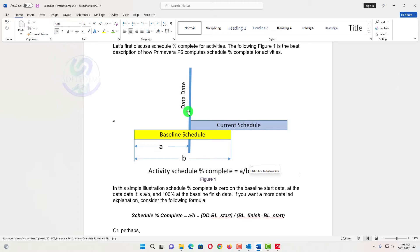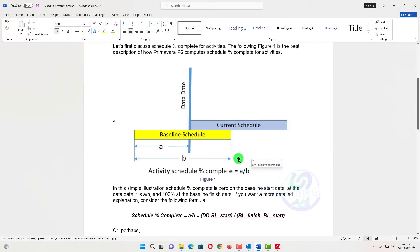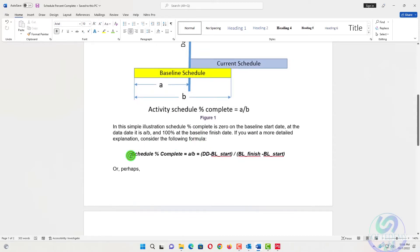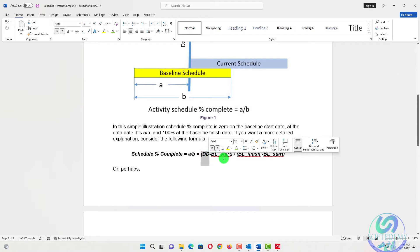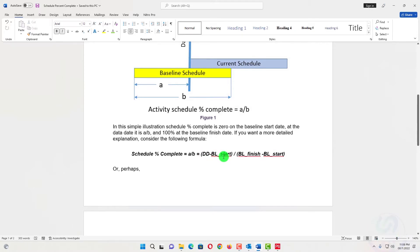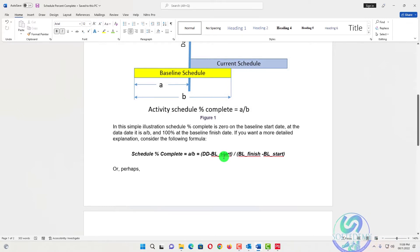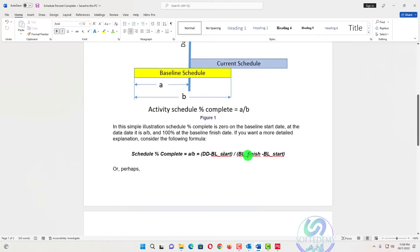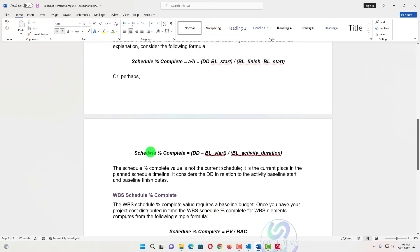Today is 8th November 2022, so the duration between the project start and today is A, and if our project is 365 days then we divide by 365 to get the schedule percent complete. The formula is: schedule percent complete = (Data Date − BL Start) / (BL Finish − BL Start). BL Start is your baseline start date, because the overall schedule percent complete is based on the baseline start date.